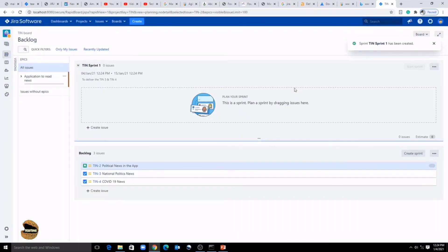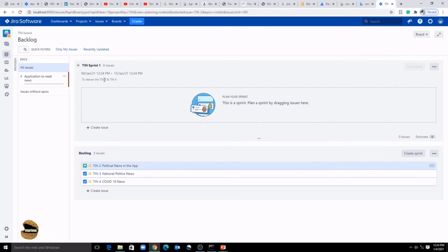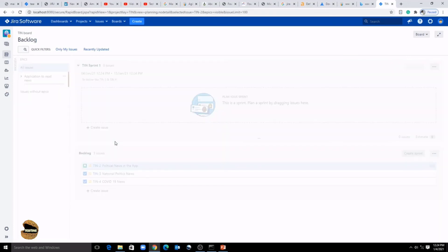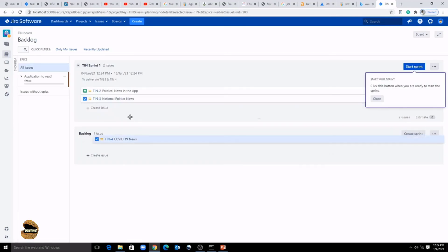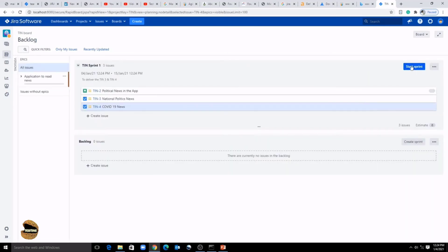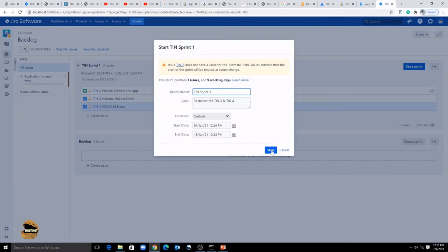Your sprint is ready — you'll see the confirmation message. Now all you have to do is drag and drop activities into Sprint 1. You can make use of existing tasks by dragging and dropping them. Once you add a task to a sprint it will be automatically associated with that sprint, and the button will automatically change to a 'Start Sprint' option, which lets you begin the sprint and start working on it. Click 'Start Sprint' and confirm — the backlog below is your product backlog and the above one is your sprint backlog.